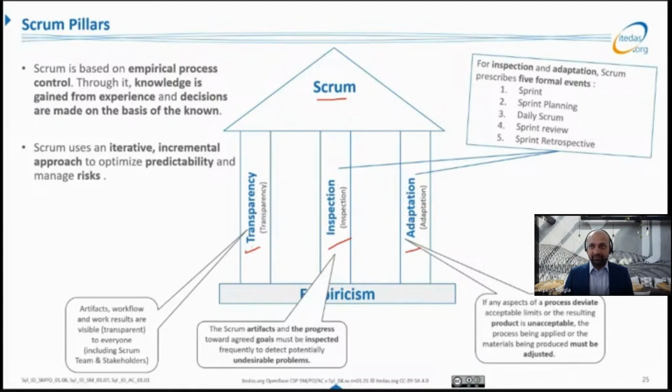So first is transparency. How we implement the transparency pillar is, we have these artifacts, workflow, and work results. They are visible to everyone in the team, including the Scrum team and stakeholders. So what it means is, you know, the product backlog, the sprint backlog, the increment itself, all these artifacts, and the work results, in terms of the increment we are building or the sprint goal we are building, all this is visible to the entire Scrum team,